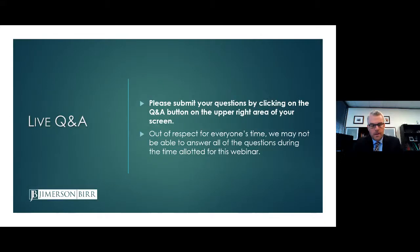If your general contractor is asking you to do that, it's one thing for them to ask you for a conditional bond waiver, which would be conditioned on payment to you. It's a totally different one to ask you to provide an unconditional bond waiver. It wouldn't be enforceable in my view, even if you did sign it. But I'm not in the business of signing away claims when I haven't been paid. So I would strongly advise you to not do that and turn around and question why the general contractor or whoever it is asking you to sign such a document, because that should raise a red flag for that particular project.